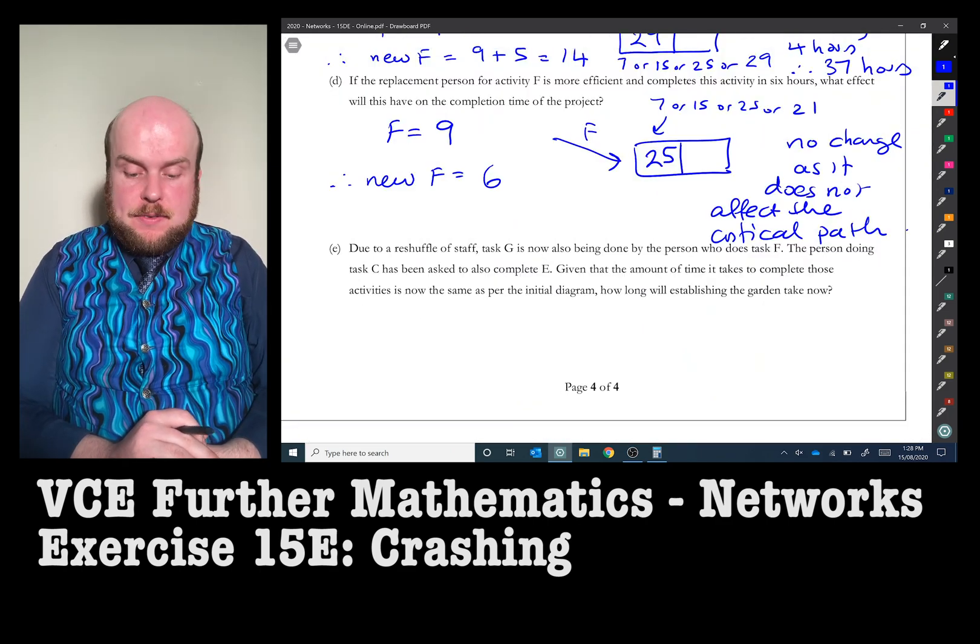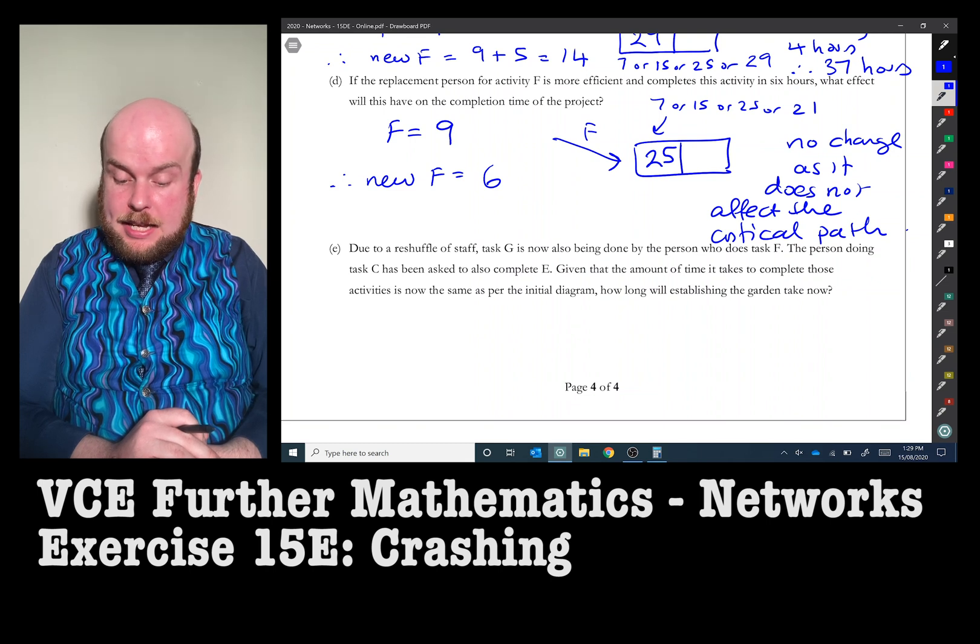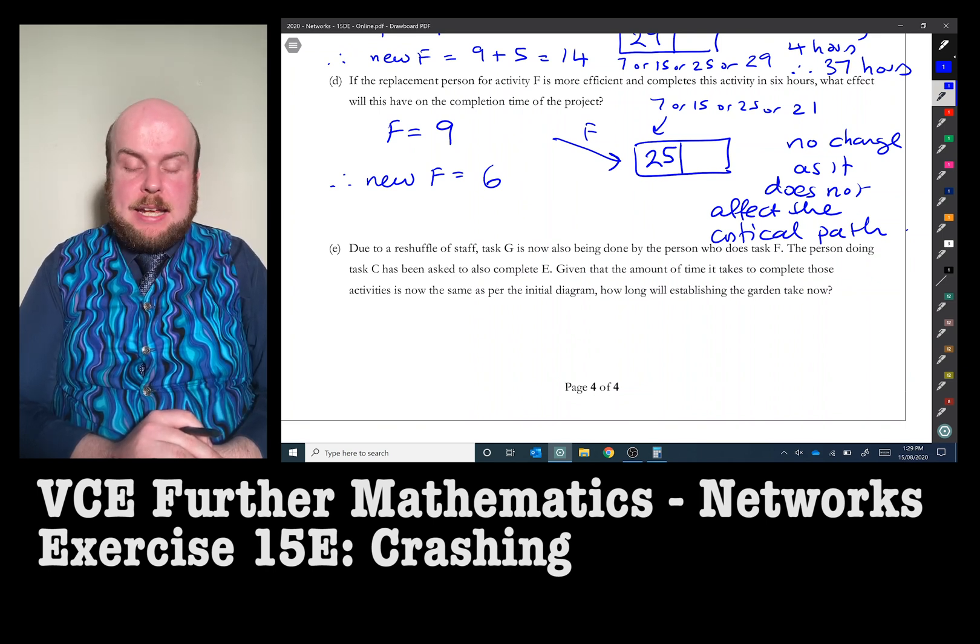Part E: Due to a reshuffle of staff, task G is now also being done by the person who does task F. The person doing task C has been asked to also complete task E. Given that the amount of time that it takes to complete this activity is now the same as per the initial diagram, how long will establishing the garden take now?